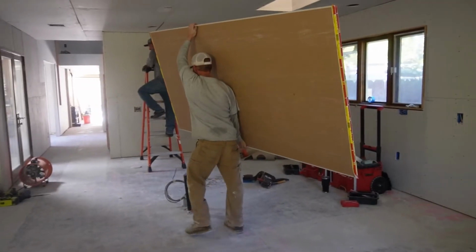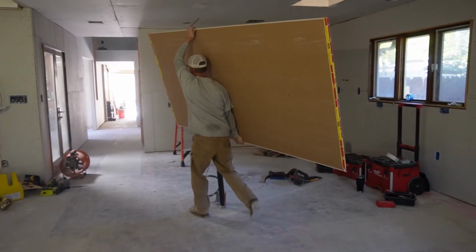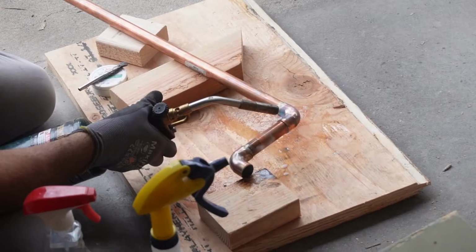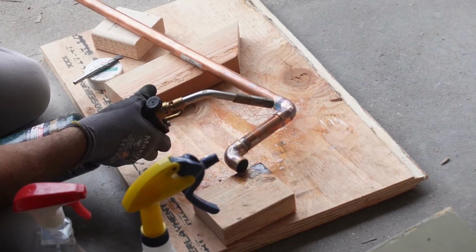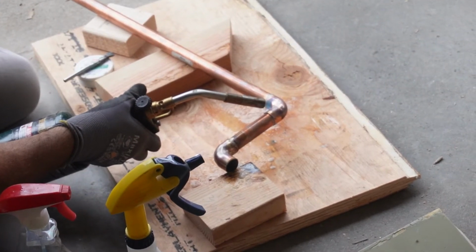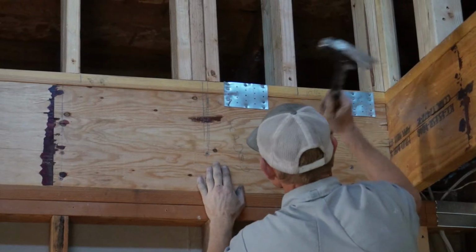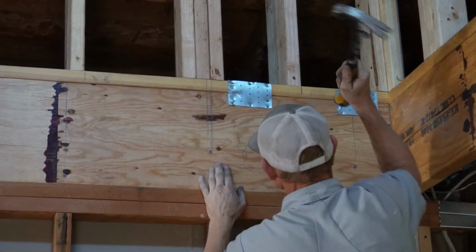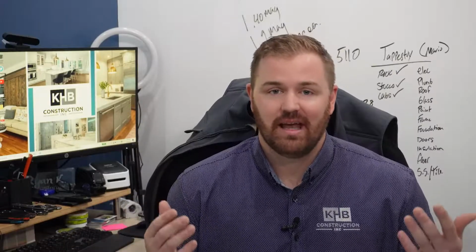The way we run things and the way most contractors run their projects is stacked, the most efficient way you can. When we get off a job and let's say a subcontractor comes in, we're starting another one. And if you change the scope of work and you push that schedule out, you are not only changing your schedule, you are changing all of our other customers' schedules, potentially. And with that, there is a cost.